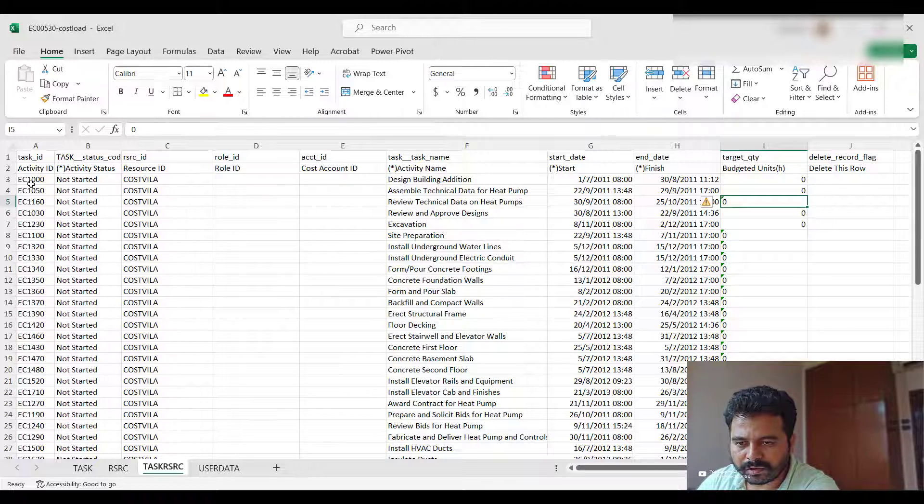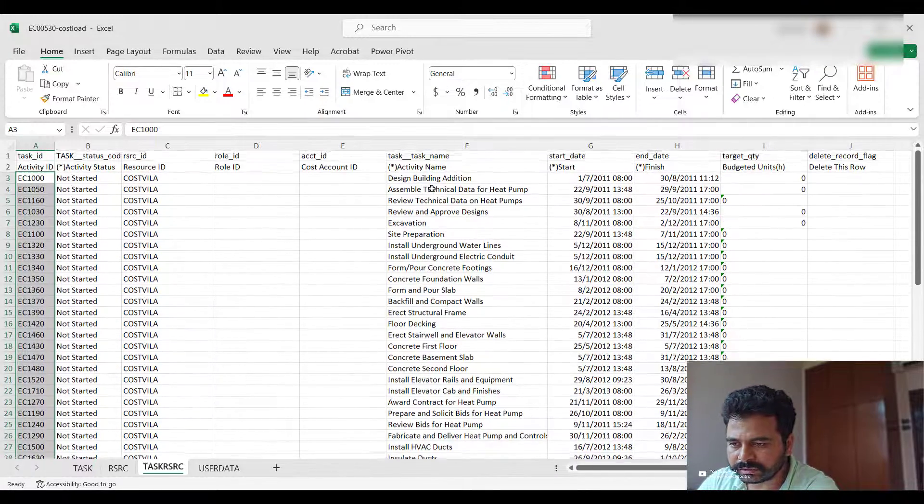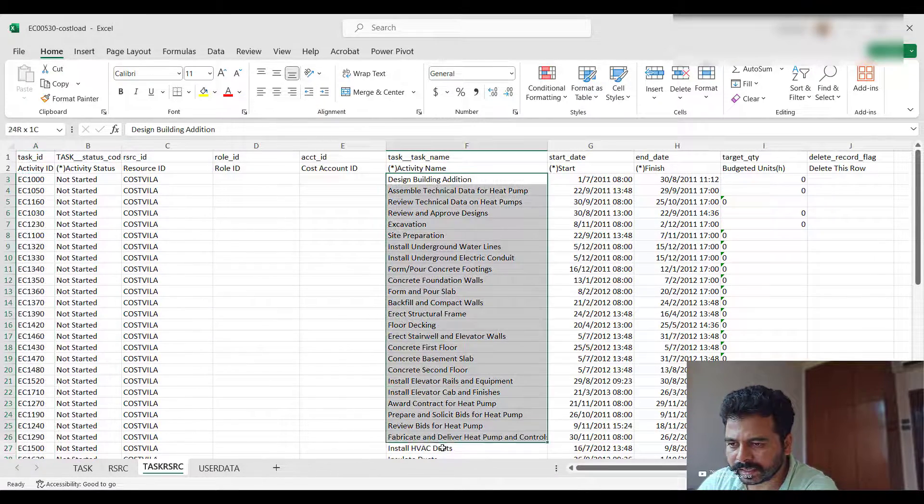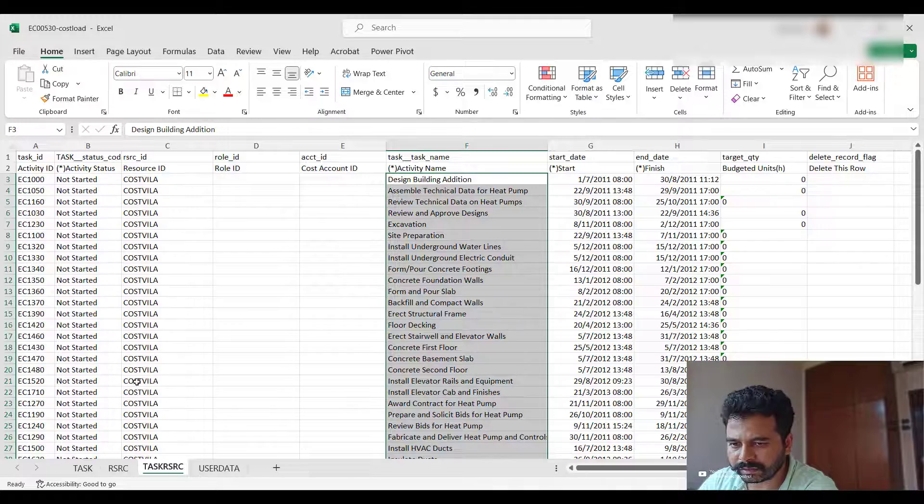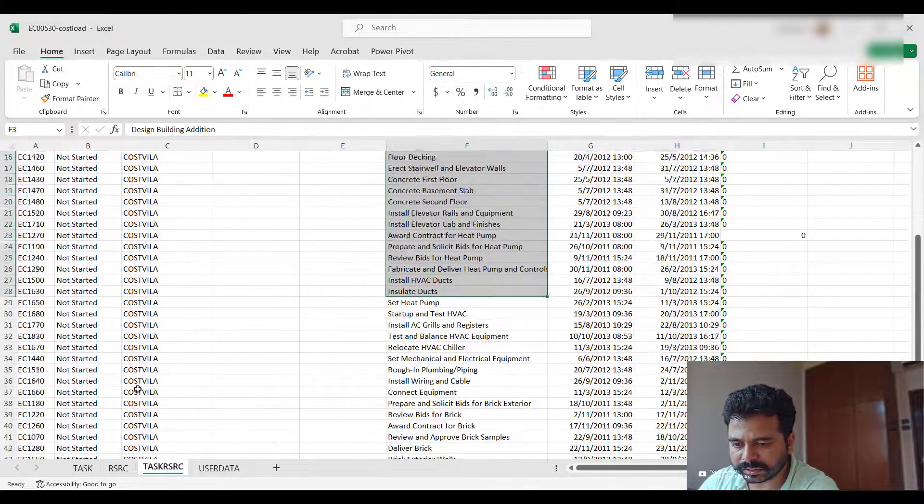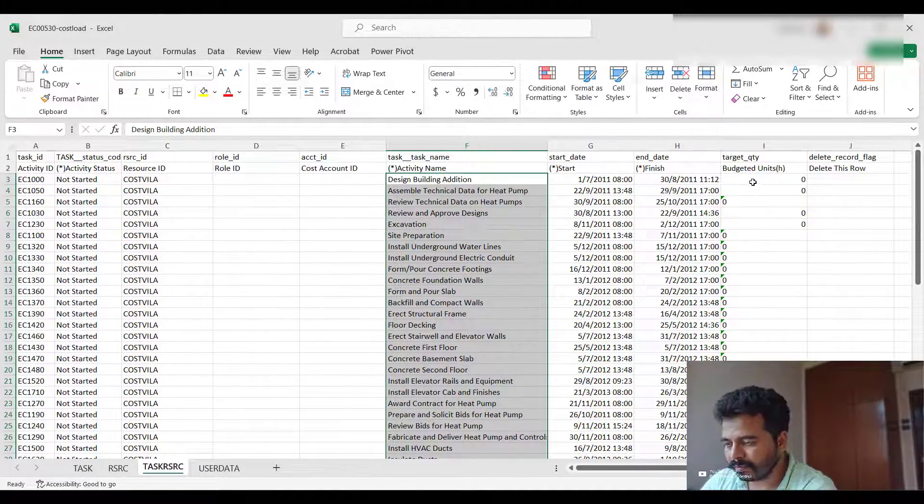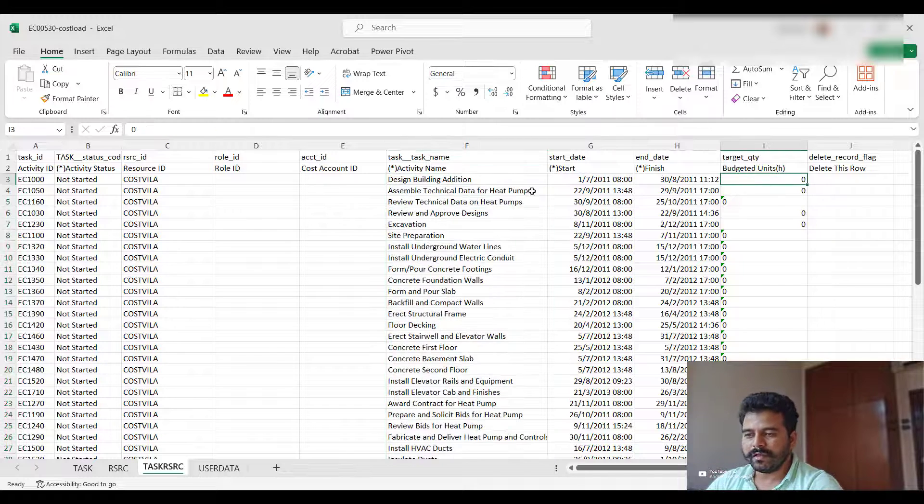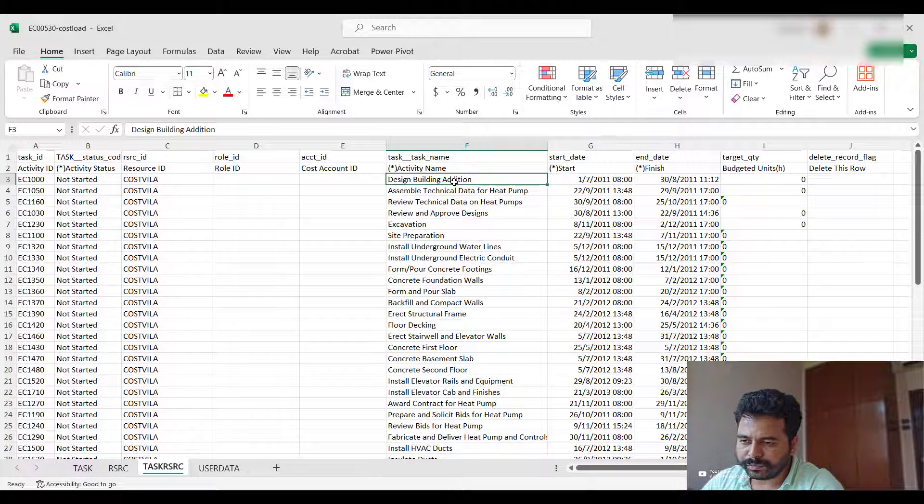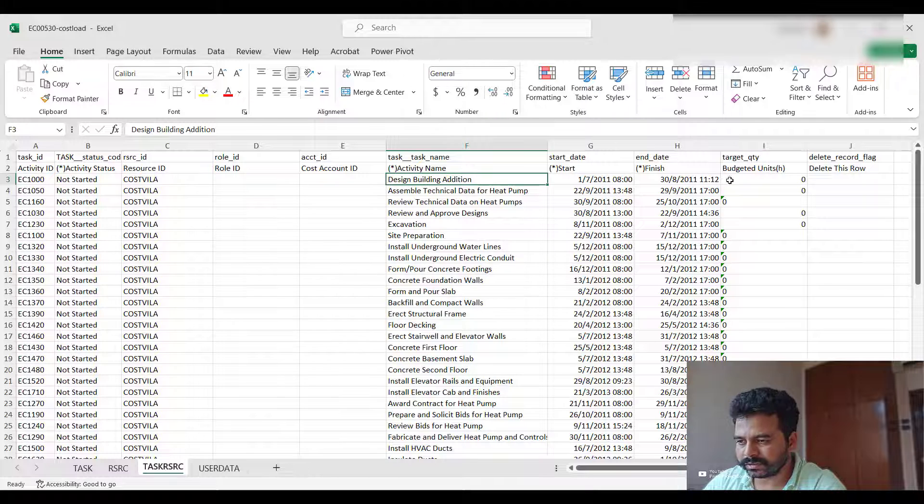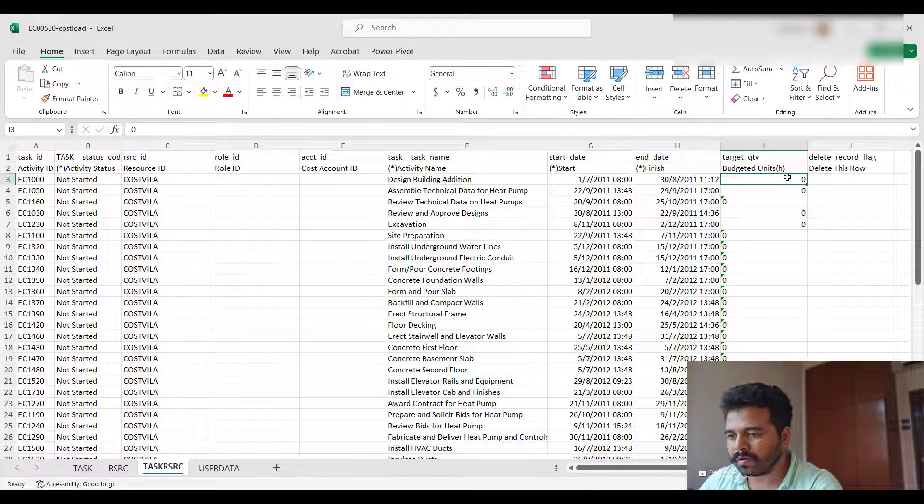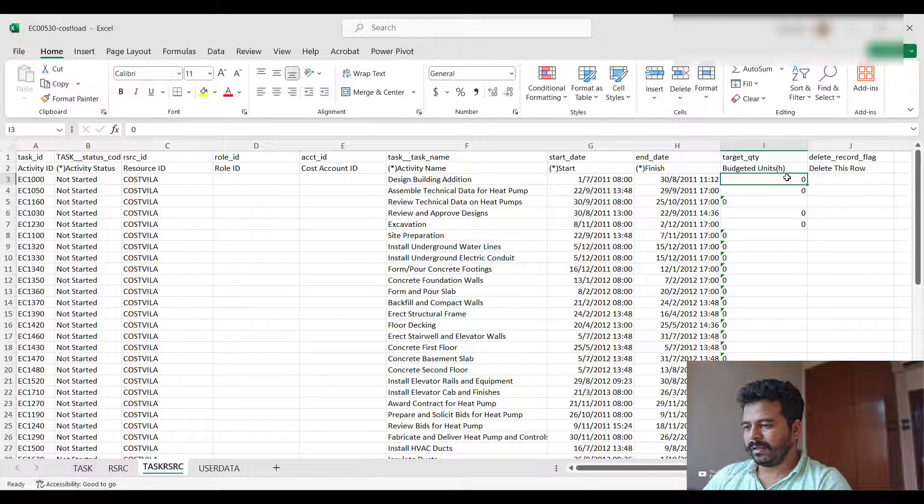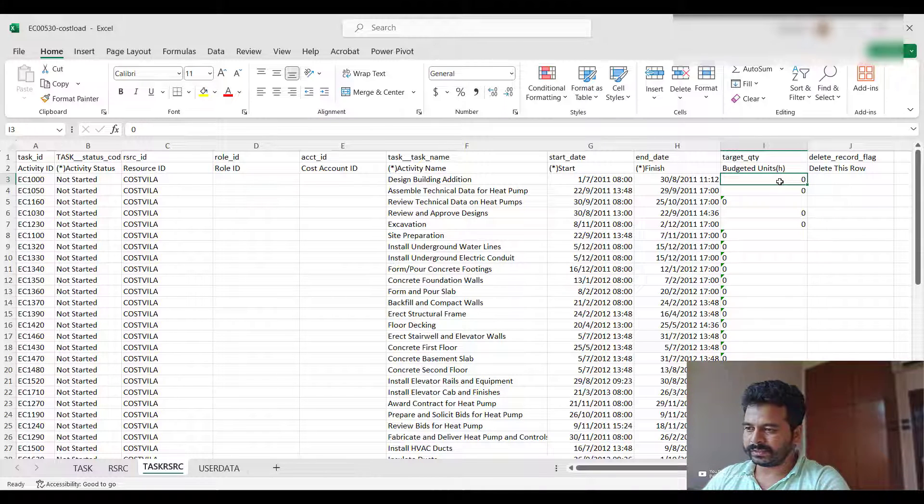What I'll do is—you see the activities and activity IDs, only those having the resource ID, it has been displayed here. So with the help of your BOQ, you can identify the IDs or activity names and you could copy-paste the cost into this Excel. It's as simple as copying and pasting.